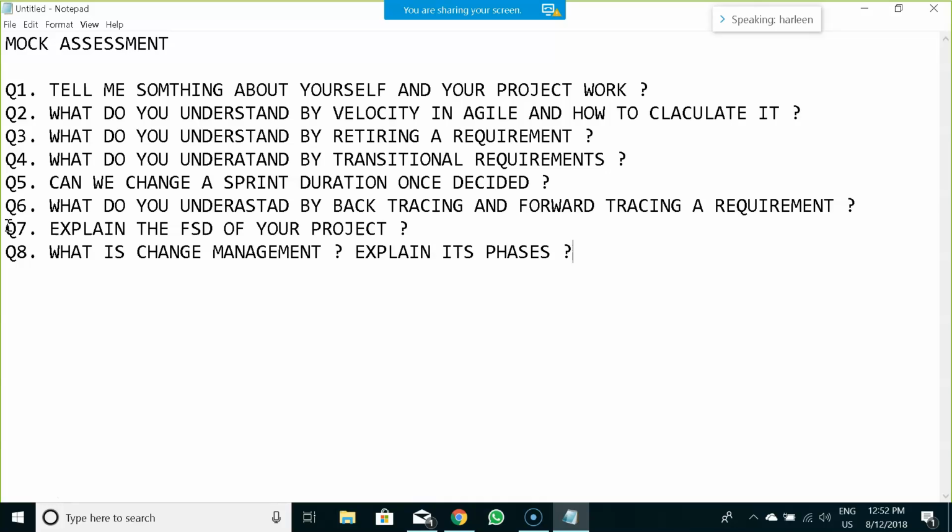Okay. So after you have done the impact analysis, after assessing the requirement, shouldn't it be approved or denied? Shouldn't it go through an approval process before implementing it? Before that, clear. Yes, in the assess for the change or the prepare for the change phase, in that case only we get the approval from the stakeholder, and then we plan it. Okay. Great.